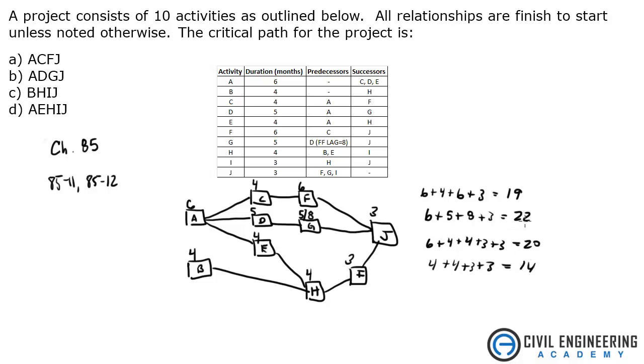So their biggest, longest path here is this guy, which was A, D, G, J. A, D, G, J. That is answer B. That is your critical path.